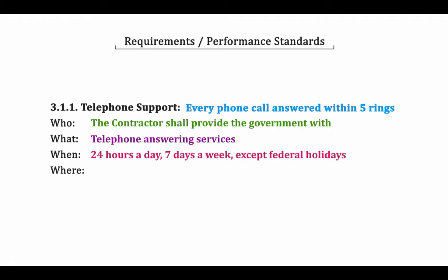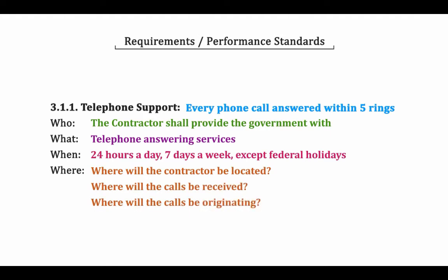Where? The where in this case is a good example of how the 6 W's can guide us into telling the contractor how to perform the task. So be careful not to direct the contractor how to do the job. I'll walk you through my thoughts on this where question. So, where will the contractor provide telephone support? There are several wheres. Where will the contractor be located? Where will the calls be received? Where will the calls be originating?